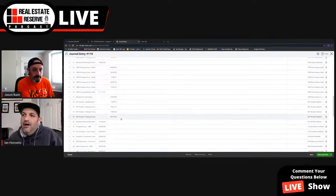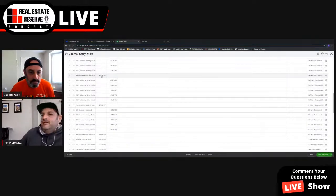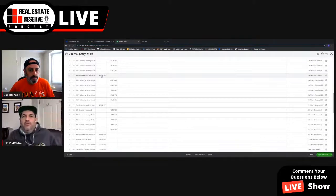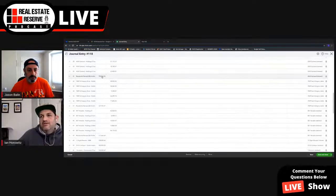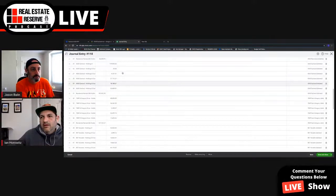Right here, we wound up spending $193,000. Our loan was for $150, and we brought 14 to the table. That was $155. We wound up spending an additional 30 grand. Well, what did we spend it on? We spent it on fixing up the basement. We did have some holding costs of about 5 grand, interest payments and other things.